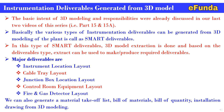We can also generate a material takeoff list, bill of material, bill of quantity, and installation drawings from 3D modeling. This is how 3D modeling plays an important role in detail design engineering work, where the majority of disciplines use this 3D model to make or enhance engineering activities with better accuracy and correct performance, so as to reduce construction rework and ensure correct implementation of the plant with minimal rework.